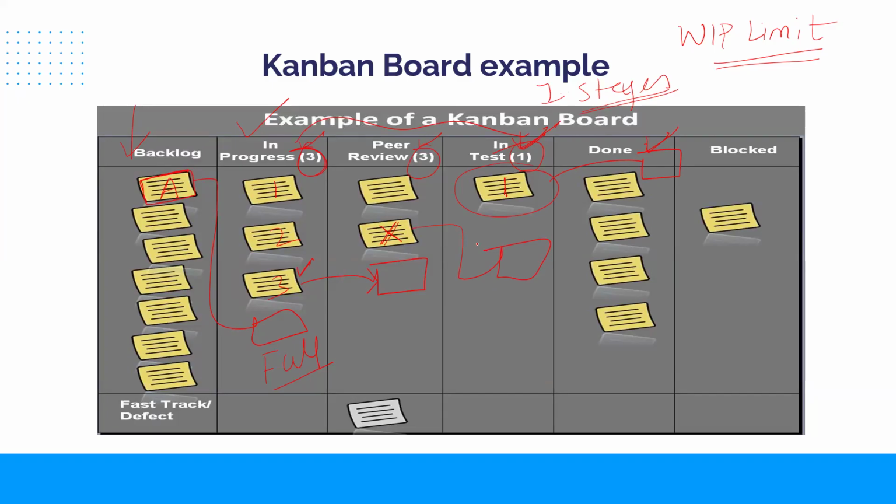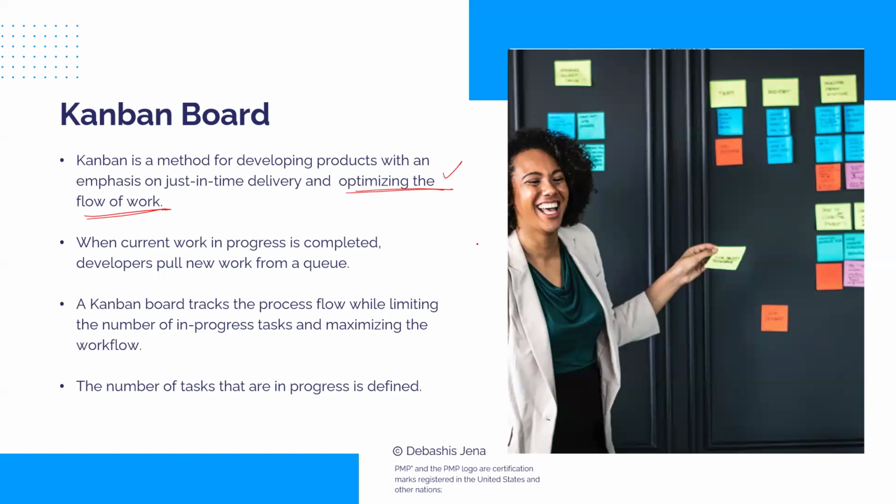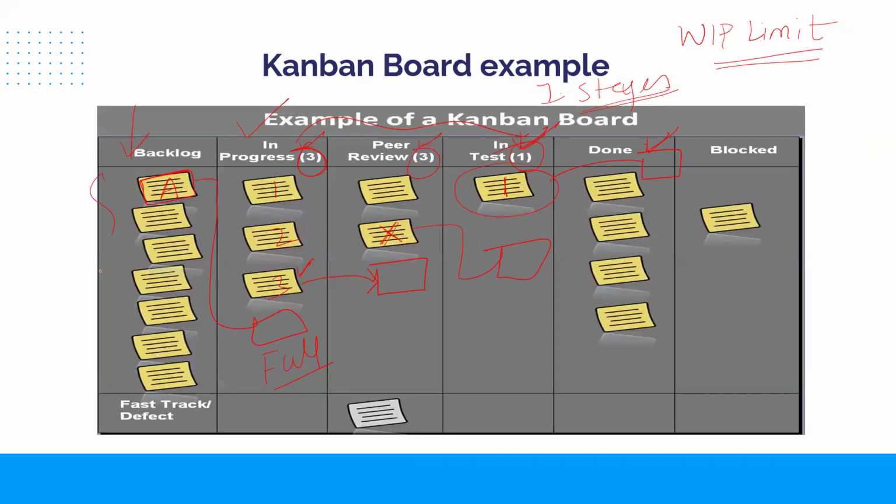Another point about Kanban I'll make now. We call Kanban a pull-based system. Look, I use the term, I'll explain. We call it a pull-based system, or pull-based scheduling. And why are we saying that? Understand. See the items in the backlog, these items that are waiting. We don't have a timeline defined for them. We don't have a predefined schedule. The team would pick up work from this backlog as and when they have capacity. That's why we call it a pull-based system.